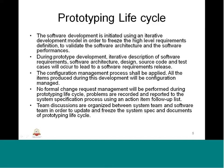To do this, the elements produced should be configured. What we do is we will have a configuration management process, and all items produced during this development will be under configuration management — it could be architecture, design, or source code as part of the prototype. All those should be configured and under configuration management. This life cycle will have all these elements covered under the prototyping, and no formal change request management will be performed during the prototype life cycle.